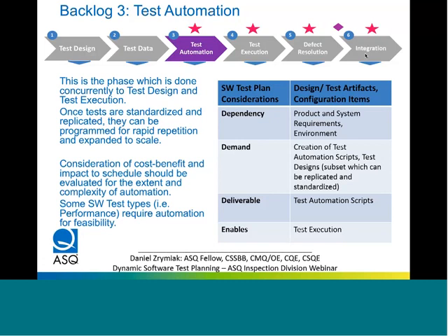If you haven't done the early steps, if you haven't designed the tests in a crisp and detailed manner, then there will be more delays and waiting as people struggle with executing the tests, and it can even require more one-on-one coaching to support some of your more novice testers. So the more robust the test resources are, the easier it will be to execute the tests.